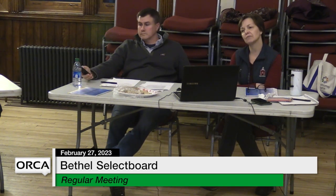Kelly has those, and I believe we're set for March 21st. We meet all the setbacks and everything, but still we're just like everybody else, we have to go through the process. So the zoning permits are out, and I have all the easements. The last thing I have to do is a driveway permit into Crystal Drive. But once the snow melts, I'll go up with Morgan and he'll tell me what we need for culvert, whatever we need to put in. So, we're following all the rules.